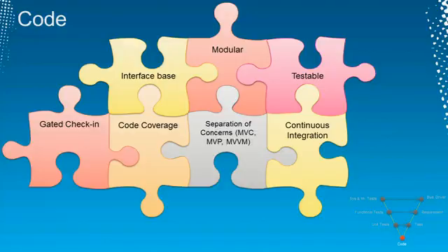Continuous integration, how many people do that? More people. Okay, continuous integration is the first and fastest way to reduce bugs because you're going to find them faster and you're going to be able to fix them faster. If you don't do that, say you only do a build once a week and you've got 5 developers, well, what is that? 5 times, yeah, that's a lot of hours of code you got to go back, look over. 200 hours of code, yeah, that works.